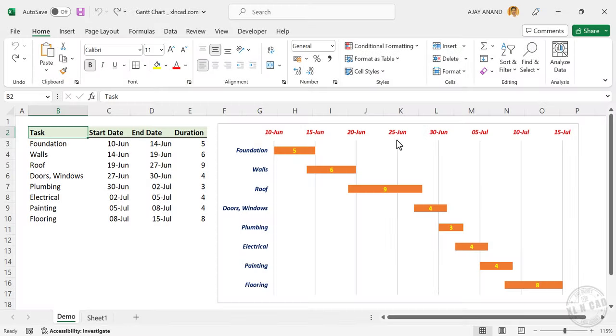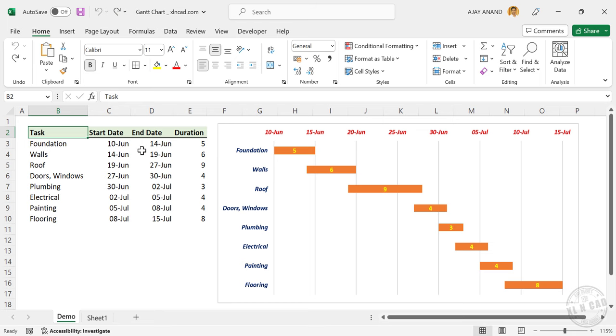Here is a Gantt chart that represents the major activities of a construction project. First activity is foundation. This activity will start on 10th of June and will end on June 14th. That means this activity needs 5 days for completion.